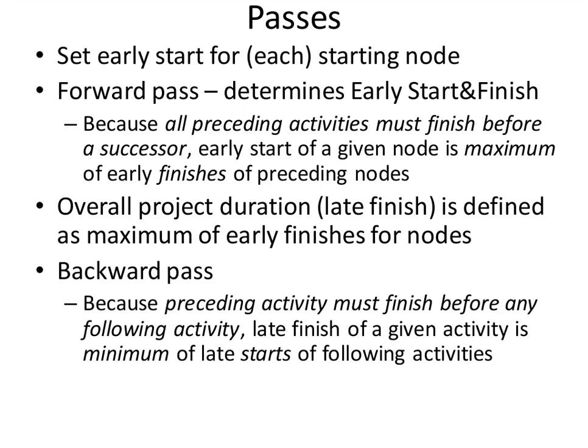Forgive the English. And then in the backwards pass, you're trying to figure out the late finish. And the late finish, the latest you can finish without delaying the project, is dictated by the minimum of the late starts of the things that depend on you.